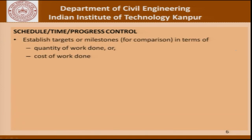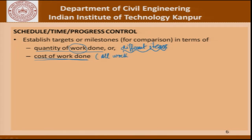As far as schedule, time, and progress control is concerned, it establishes targets or milestones for comparison in terms of either the quantity of work done or the cost of work done. The difference between quantity of work done and cost of work done is something we will discuss extensively. The quantity of work done depends on different items, whereas when it comes to cost of work done, all work can be reduced to a total cost — that is the advantage of working with cost.